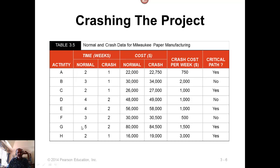For example, activity G under normal conditions takes five weeks, but it can be done in two weeks — so there is three weeks worth of crashing possible for G. The next two columns are normal cost and crash cost. Under normal conditions, G costs $80,000 and takes five weeks, but for an additional $4,500 you can finish it in two weeks.